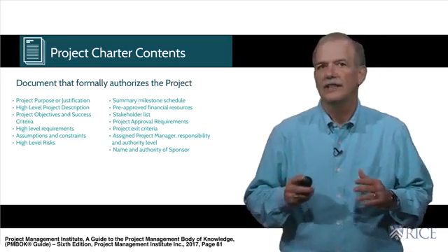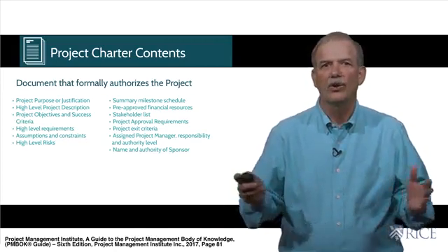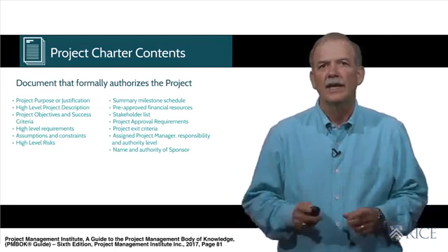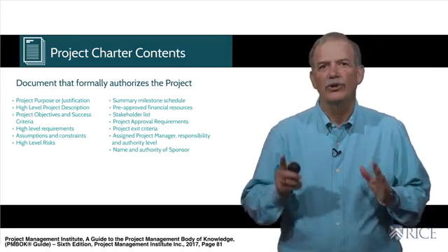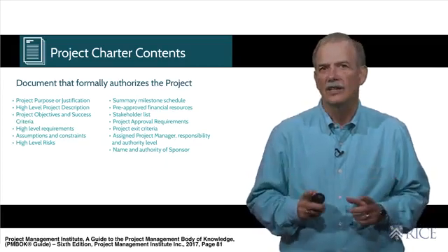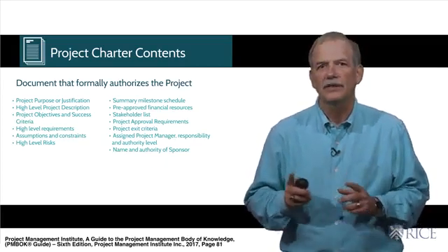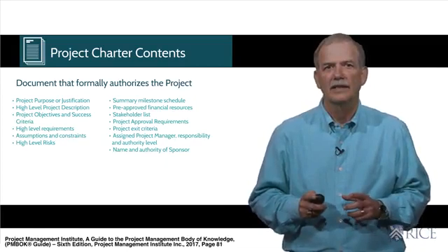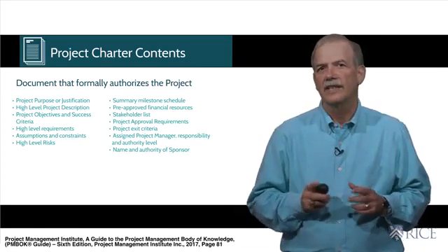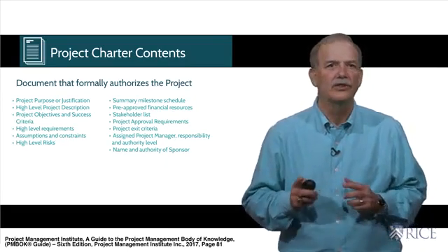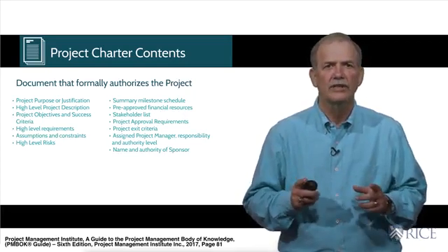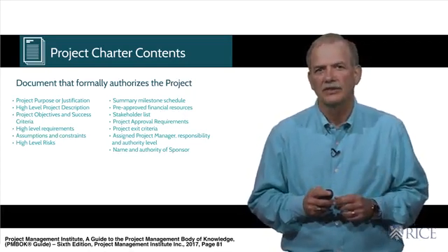At first glance, it looks like a lot of information in a long document. However, in reality, the project charter should be a 1 to 2 page document highlighting the key aspects of the project. Let's discuss some of the key elements by having a look at a project charter template included in the resources section of this specialization.